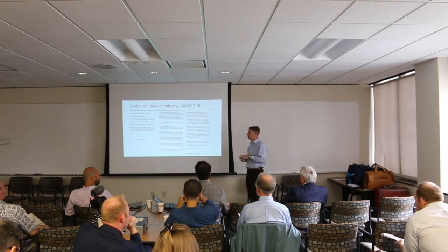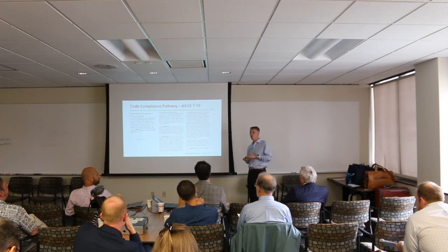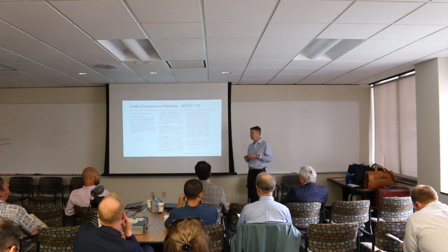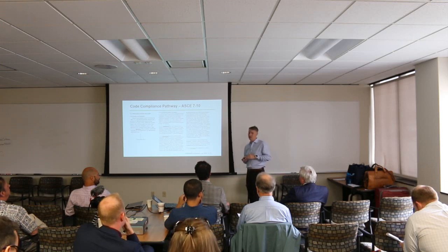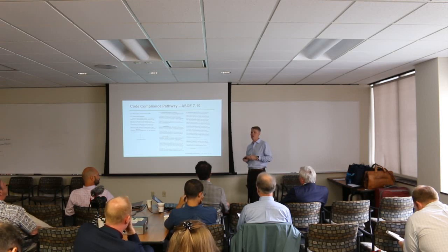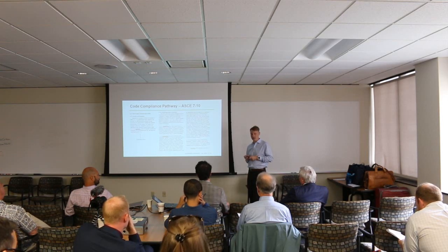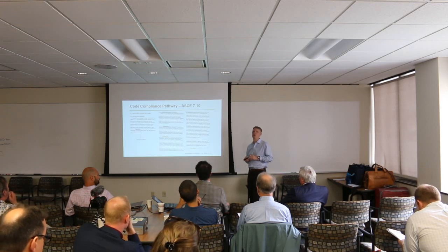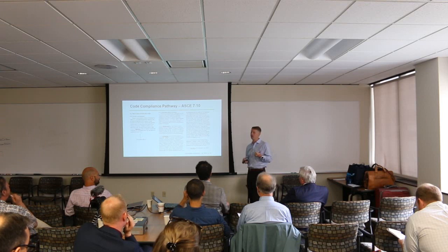And unfortunately, that's been the stance with the city of Seattle and the city of Portland. They said, we want to set up a committee. We want to get an RFQ. We want to develop an RFP or a peer review committee. And we're going to tack on 12 months to your development schedule. In the three meetings with the city of Seattle that I went into, the developers literally walked out the door. Like, that's not going to work. We don't have an extra 12 months to go build a building. We're going to do steel and concrete.